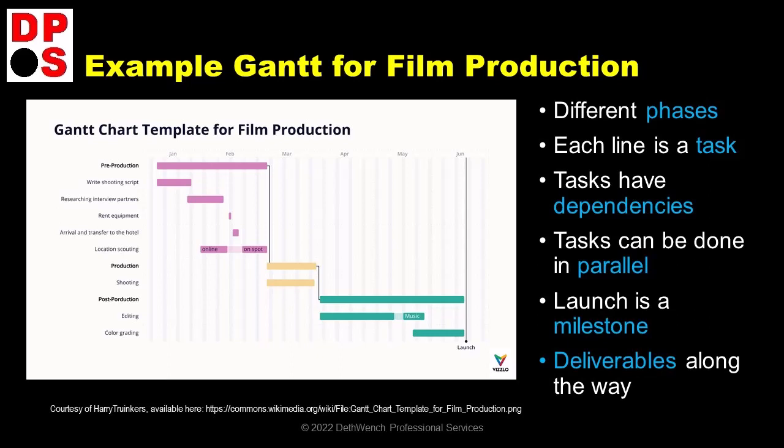So right away, we see the pre-production phase — the pink phase — will last from January through about the middle of February. And if we want to know what all is happening in the pre-production phase, we can see the breakdown of tasks in pink below it. Notice how the first two tasks in the pre-production phase — right shooting script and researching interview partners — kind of overlap at the end. This just indicates that these two tasks can be going on simultaneously.